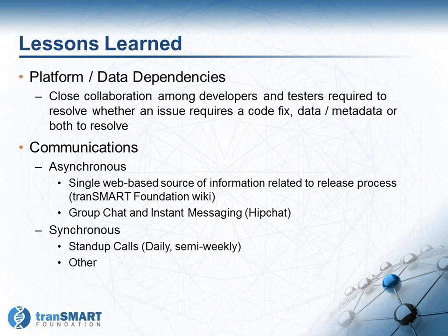In terms of platform and data dependencies, I already touched on this, but many issues surfaced during the May to July timeframe. Those issues required close collaboration among developers and testers to understand whether a particular issue, which was a result of bringing about a dozen different code branches together, was a code issue, a data issue, or in some cases both code and data. And so it really did require a lot of close collaboration.